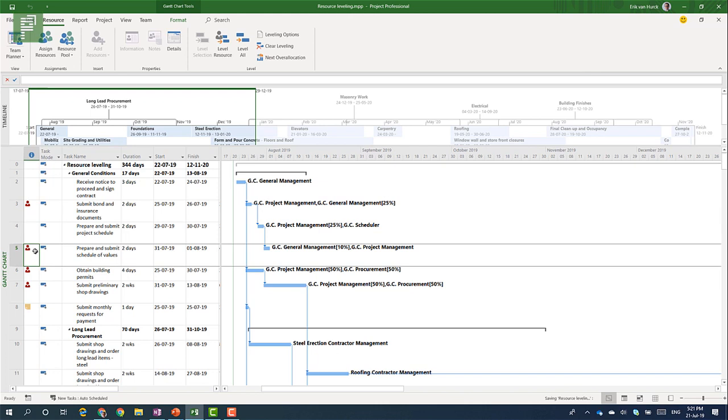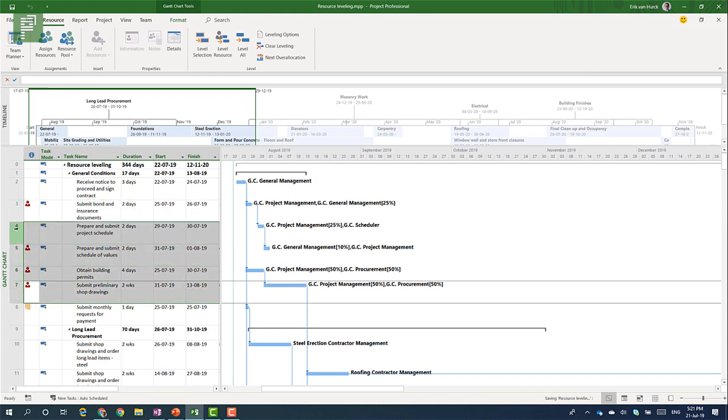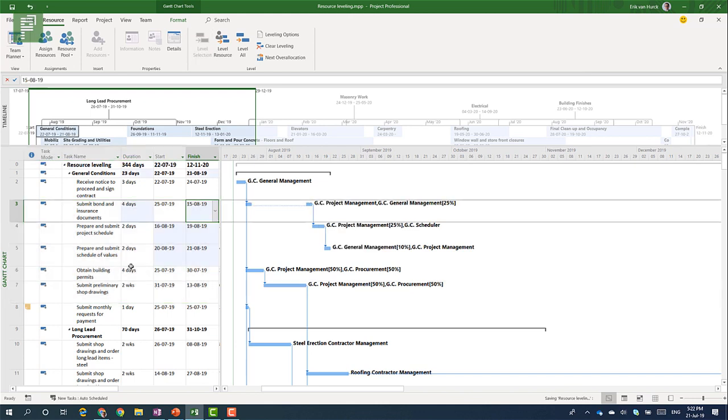So the resource over allocation for this task comes from a section outside that selection. And the same goes for this one here. There is an option to level a selection but that needs to be a selection where the over allocation actually happens. And that is not the case with these two over allocated tasks. If we select more than those two, let's see what happens then.